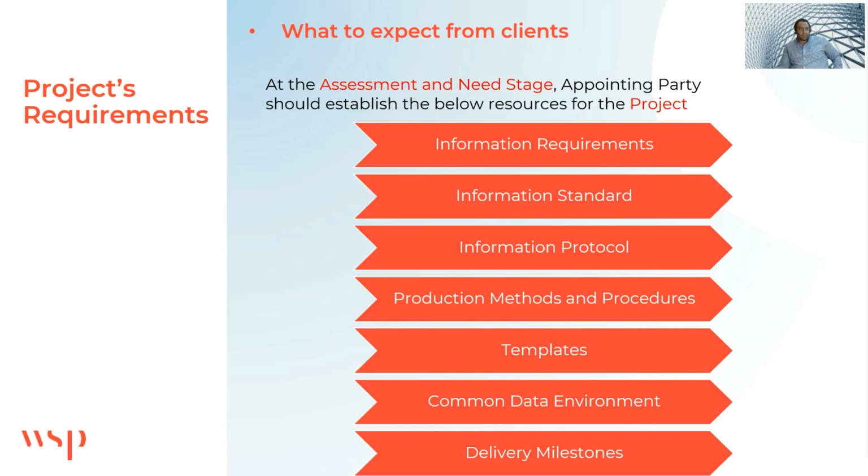For example, is there a specific naming convention? So the naming convention on its own is an information standard. So this is something provided by the client. Information protocol to define the responsibilities and the ownership of information. Also, they should provide the production methods and procedures. So they should define, for example, how existing information will be captured. Okay, so how also the review or the approval of information should be done.